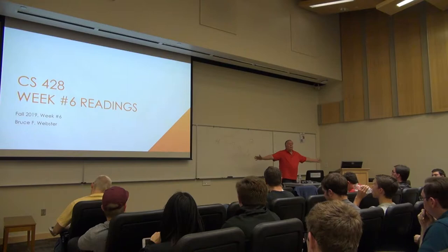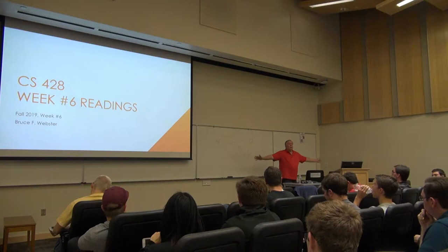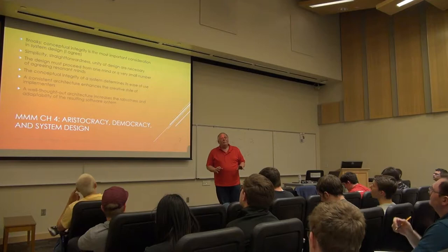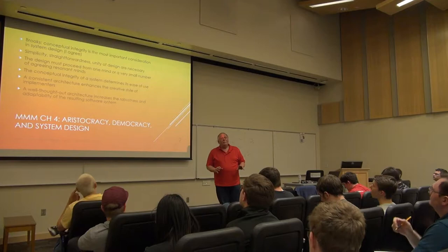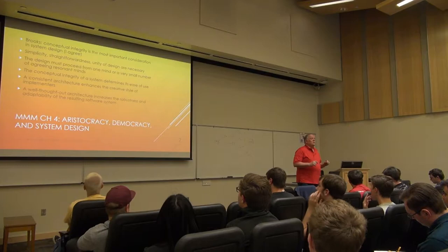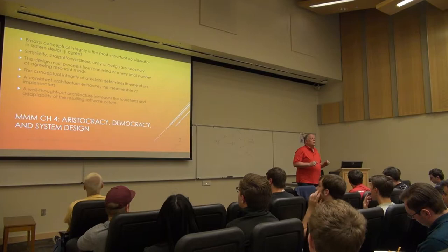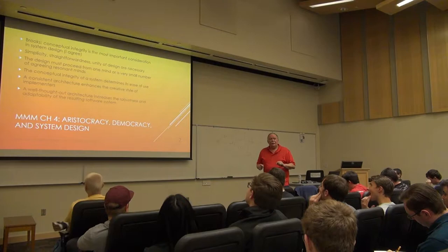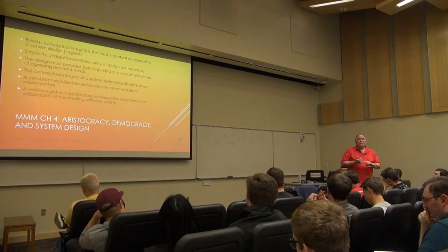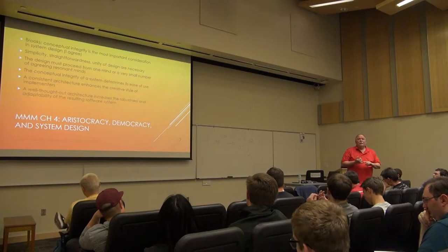And you're doing all this and you don't have an architecture yet, which may change some other things. This may be the second most important concept in Mythical Man-Month: the need for conceptual unity, and that usually means the need for a chief architect, or at the very least an architecture team. Without that conceptual unity, you have exactly the problem someone described - people who had completely different ideas as to how aspects of the program are going to work. You need someone whose job it is to ensure that there is conceptual integrity and unity within the software.